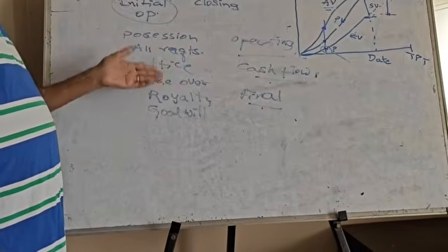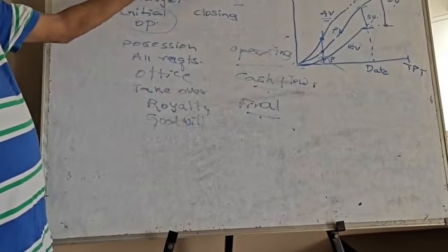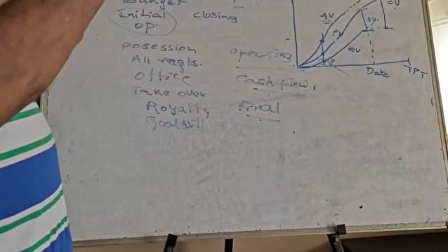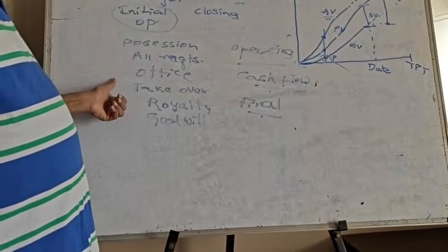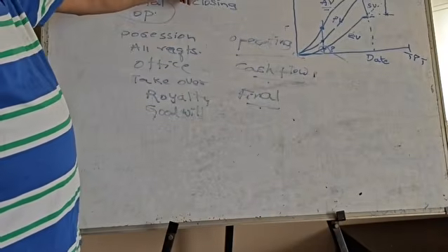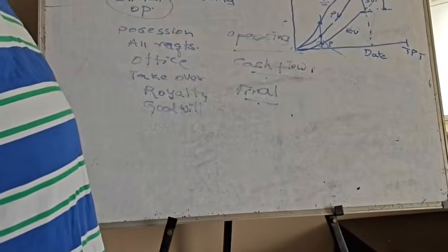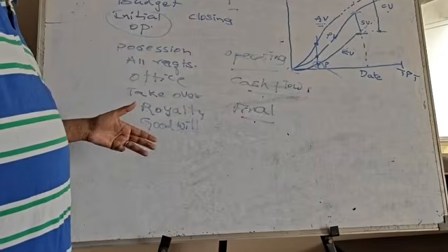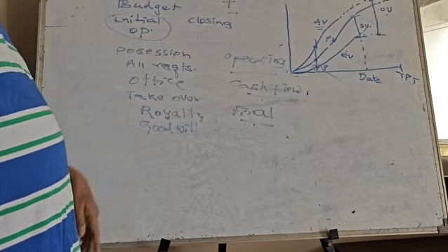Now during the recession period, because of this cash flow, at least 85% or 75% of the buildings were not able to be completed. When I got a survey done in a particular city, we asked them to check BOQ and cash flow and the link between these two. Once they linked these two, they came to a conclusion. They stated that 75% of the buildings' completion was not done because of the stopping of the cash flow, because of lack of cash flow.